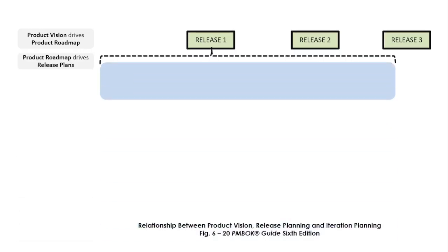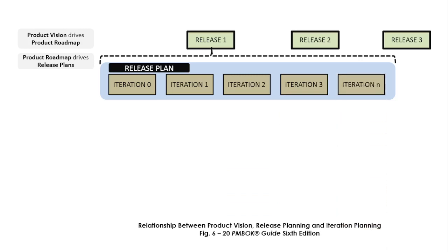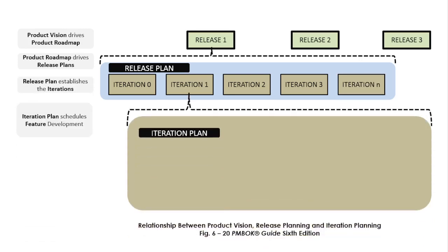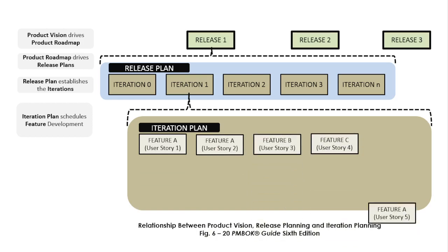It starts off with understanding the vision. From understanding the vision, you begin driving a product roadmap, which considers releases. Under the release level, we talk about the different iterations in each release. The release plan contains a higher-level plan of chunks of work that we'll be doing in iterations. Under the iteration level, we come to a concept known as a sprint plan or an iteration plan — this is where we decide which features we will complete at the end of each iteration.